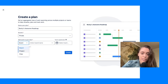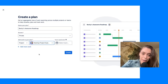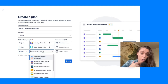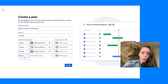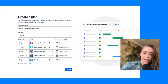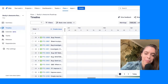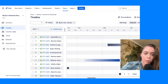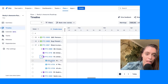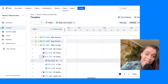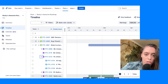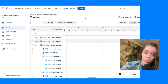You can choose from multiple projects, bring them all into one roadmap, and then add filters and other configurations to make them look exactly the way you want. Unlike the Jira Timeline option — which only allows you to show one Jira project — as you can see here, I am adding quite a few. Once I have the projects chosen, I can configure it the way I want. The data is nested, and another nuance is that you can actually drill down to the subtask level, though for an Epic Roadmap that's probably not as relevant. You can move bars around and add filters to decide what to display.